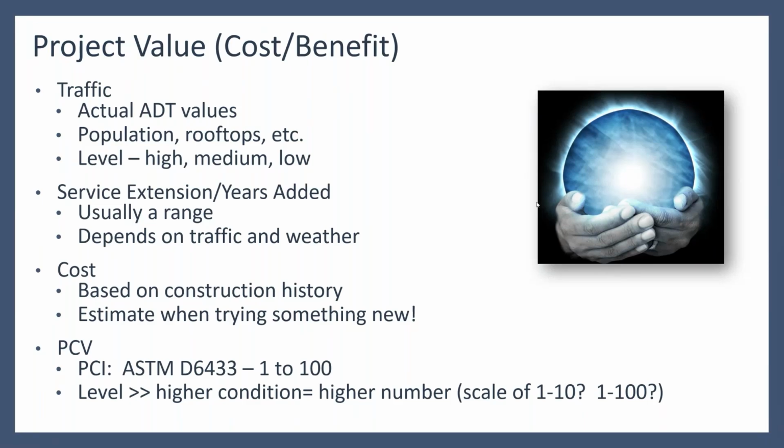A contractor trying something new is going to build in a fluff factor to their estimates, but once everyone gets comfortable with it, or maybe you buy some more equipment and don't have to contract out that part, those numbers will change. So keep tabs on that.